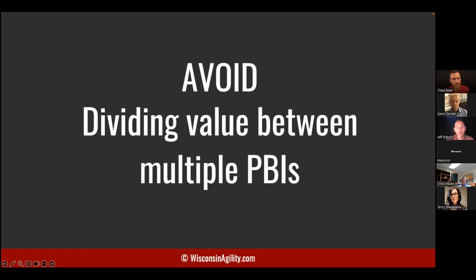I don't know. But if you start putting the why inside of your titles, it's so much easier for product owners to order their backlog. So much easier to talk with your stakeholders about why you're making the decisions you're making inside of your backlog. Those are the hard decisions, right? Let the how, the solution, come out in sprint planning and let that all be discovered there. You can have the details you need that come out of refinement, but keep that why front and center, because that's the reason you're doing this thing. That's the reason for the investment.